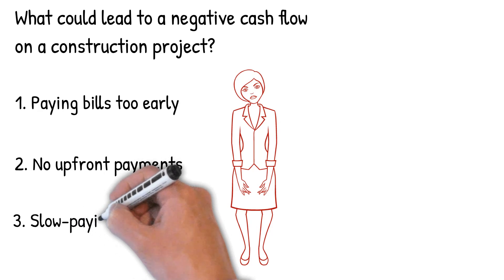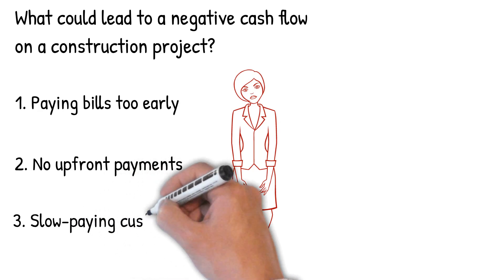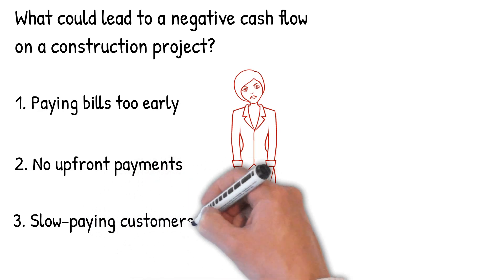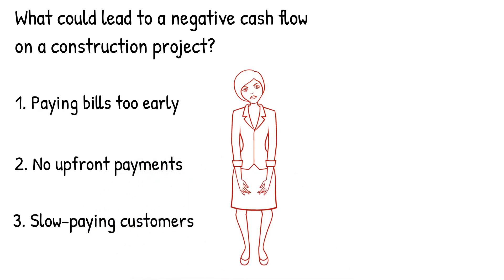Slow paying customers. A contractor's cash flow is almost bound to take a hit when customers are slow to pay their bills. The further a company is from the top of the payment chain — such as a subcontractor, for example — the longer it could have to wait.